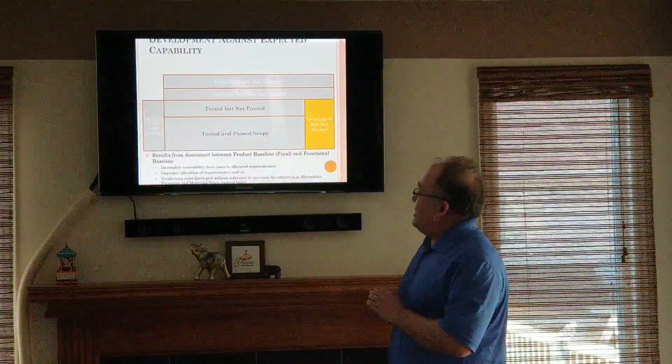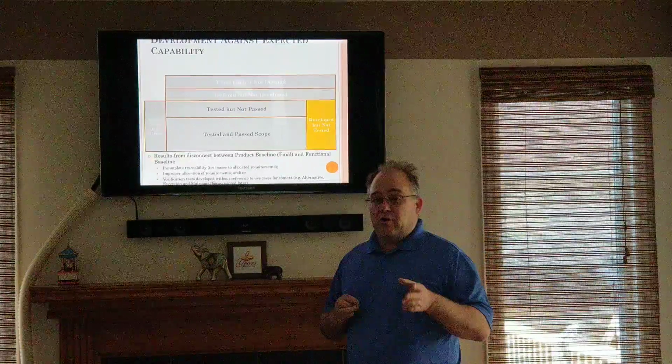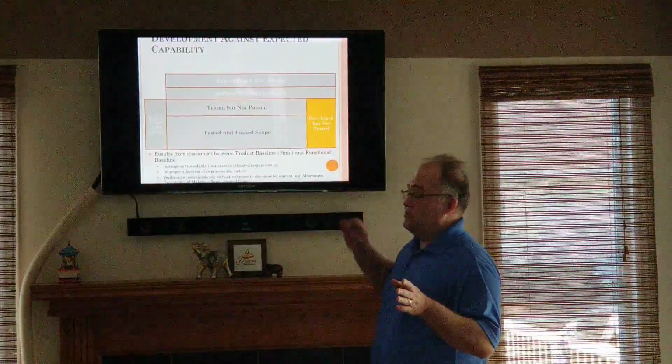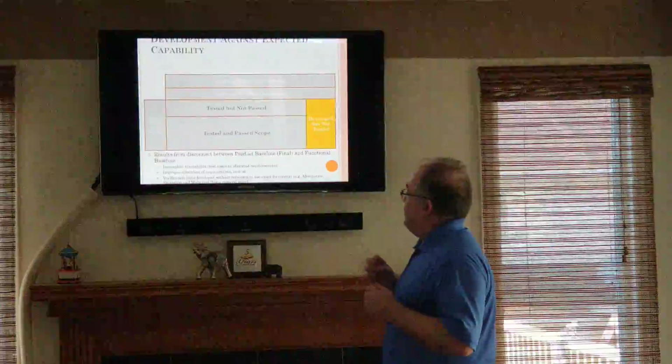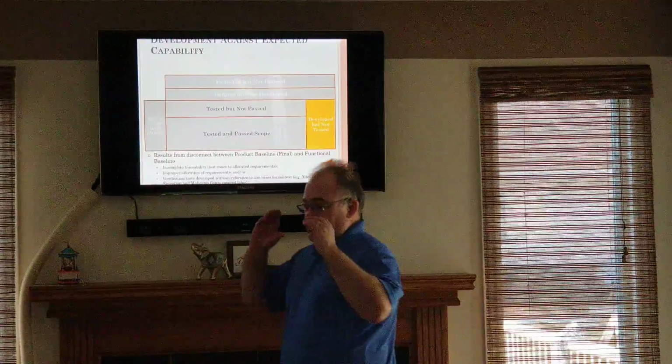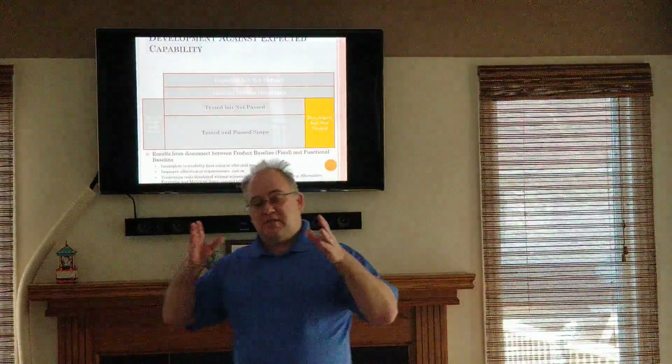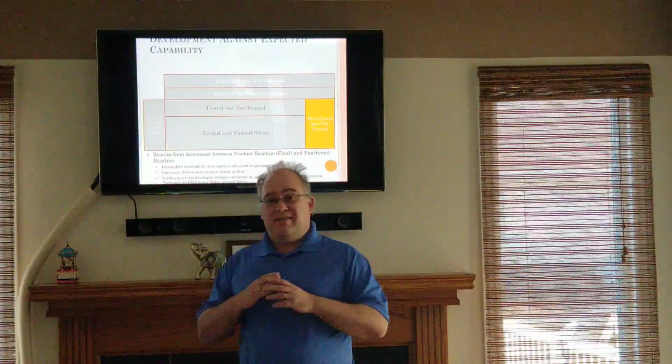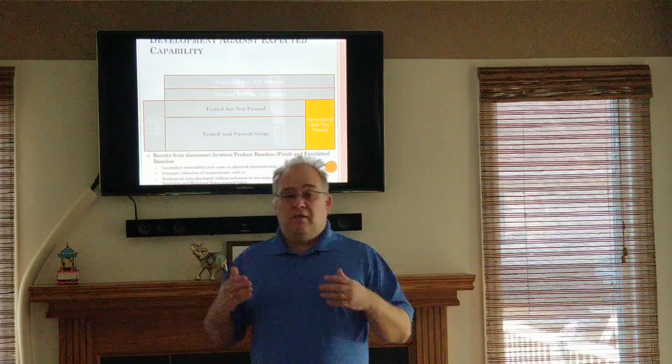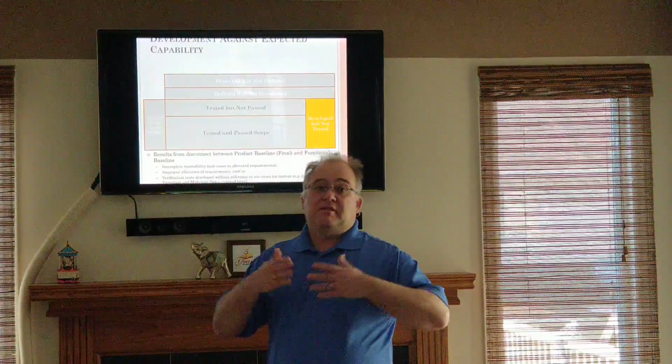The developed but not tested, this results from a disconnect between that product baseline final and the functional baseline. So the functional baseline is what is defined by the systems engineer through the design process and saying, this is what's going to be delivered in this build. In a single build development, that means it's everything.